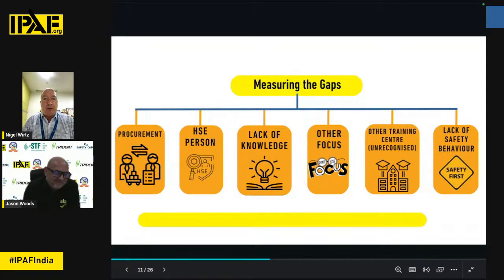One of the things that we're looking to do is to introduce the thing called BIM, basically a visualization system to communicate the design. So what you do is create a visualization of how a structure is actually going to be constructed, and you introduce your safety measures into that. If you are going to use a MEWP, it would be introduced at stage number 3, used from stage 3 to stage 5, and it'll show you exactly how you'd operate it. If you look at, for example, metros, where you position your MEWP is vital, because you've got traffic management going on around it, and you have to design that. Once you put your outriggers out, you need to put protection around that machine, and that has to be designed. So part of the planning has to include this.